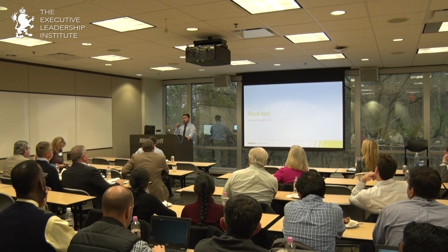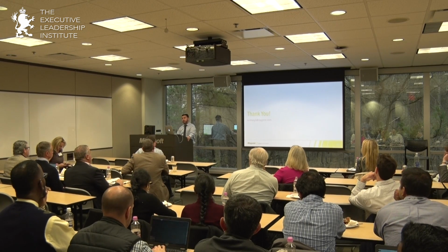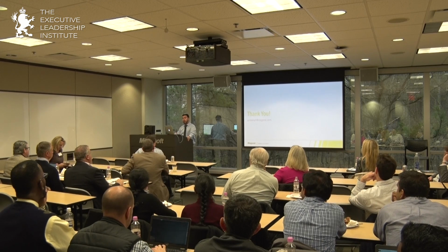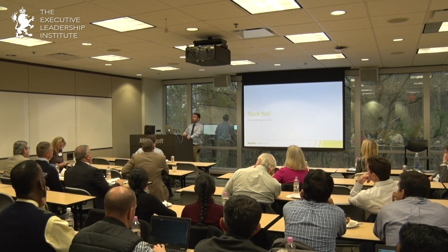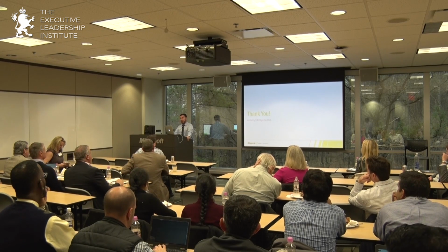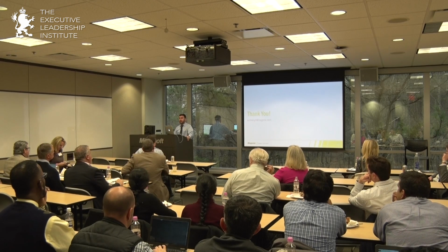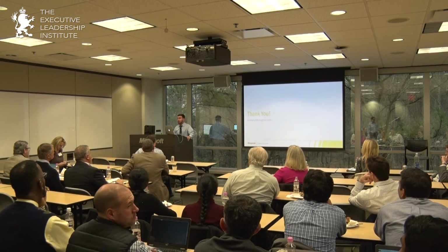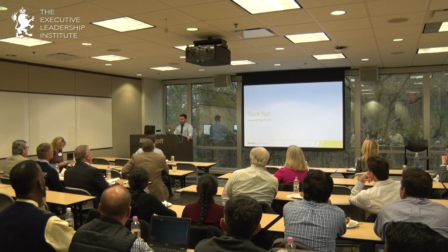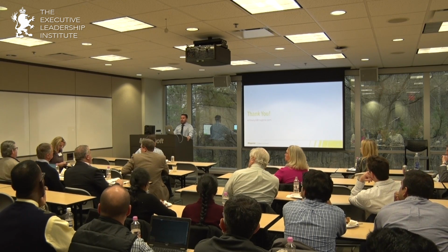So to be fair, inputs into that come from all directions. They come from the business stakeholders, they come from the users, they come from the project team. So if you raise your hand after 2 days of working with some user stories and say, wow, we really underestimated this, it's responsible to go back to the project team and say, you know what, we really think that this is going to take us 3 sprints to design instead of 1. Hey, wow, too late, you've already signed the contract.